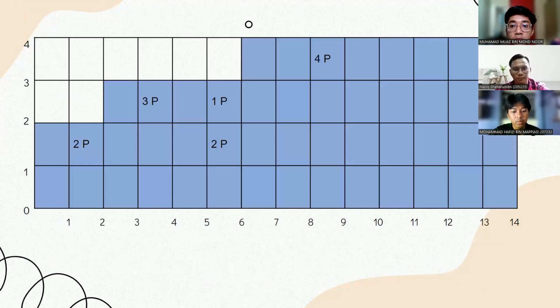Next. So basically, as you can see, based on our leveling, the leveling is very smooth, because if we delay the irrigation, they will be up and down rather than smoothing. So that's why delaying the irrigation is not a good choice.